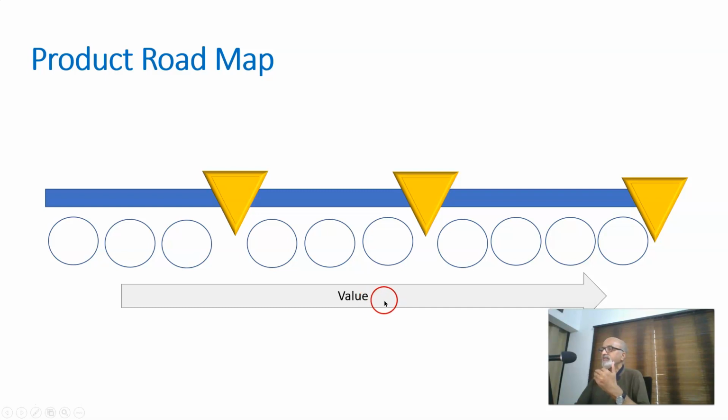Now if I am developing the course, I have 10 iterations to develop. If I develop iteration 10, it is of much value to the participant. Maybe I should start from iteration 1, 2, 3, maybe complete predictive project management. So I release something tangible there.